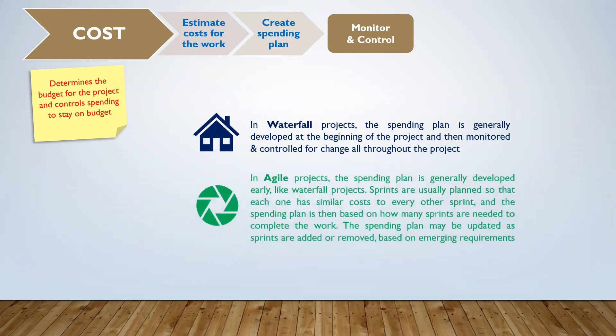In agile projects, the spending plan is generally developed early, like waterfall projects. Sprints are usually planned so that each one has similar costs to every other sprint, and the spending plan is then based on how many sprints are needed to complete the work. The spending plan may be updated as sprints are added or removed based on emerging requirements.